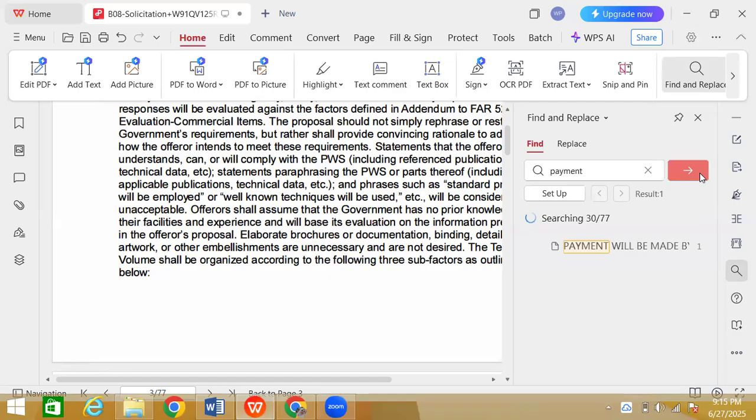So what are payment terms? Basically there are multiple things in payment terms. One thing that you need to know is that whatever payment terms the government tells you, you are not allowed to share that with the vendor, like the mode of payment, anything else that they shared with you in the documents, you are not allowed to share that with the vendor, okay?